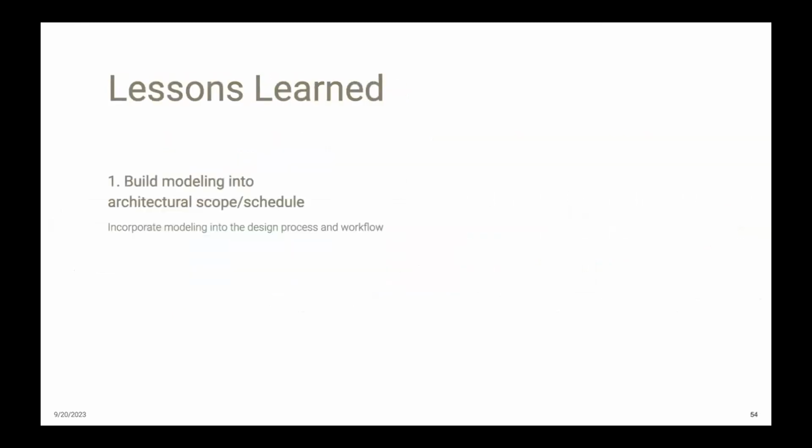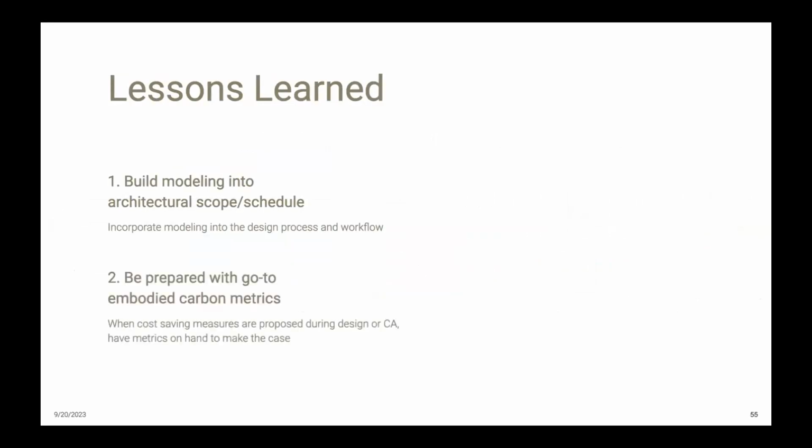Next. So in terms of lessons learned on this project, one was to incorporate iterative energy modeling into the design process and the workflow to ensure that it happens on every project. It may have been extra at some point in the past to energy model our projects, but going forward, it needs to be the norm.